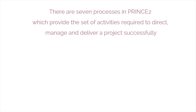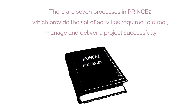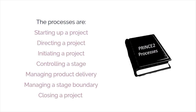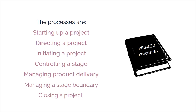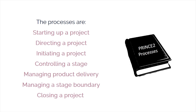There are seven processes in PRINCE2 which provide the set of activities required to direct, manage, and deliver a project successfully. The processes are: starting up a project, directing a project, initiating a project, controlling a stage, managing product delivery, managing a stage boundary, and closing a project.